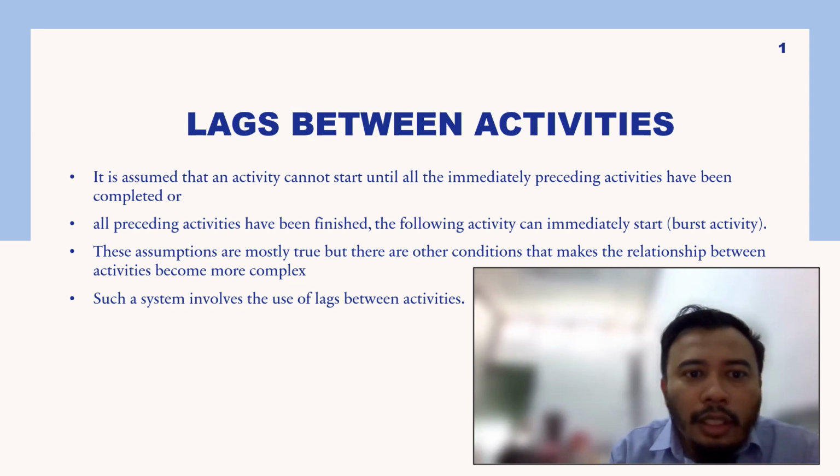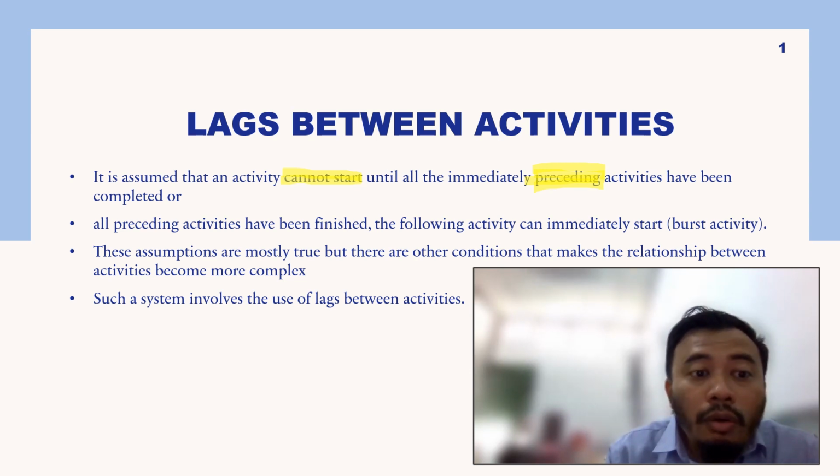It is assumed that an activity cannot start until all the immediately preceding activities, the previous activities, have been completed or finished. So the following activity can immediately start.